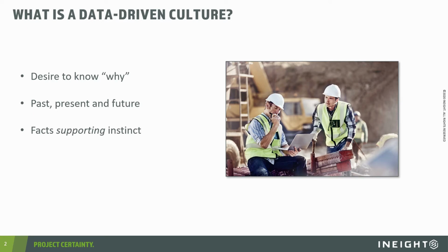If you are looking to achieve a certain productivity factor or accomplish a specific amount of work per day and have never been able to accomplish this in the past, utilizing historical data can help you point to what you could have done differently to meet this goal in the future. In bidding new projects, examining similar past projects can help in accounting for change orders that might arise. Using trend analysis can inform project personnel of where they are projecting to end their month, year, or even project completion. And more complicated predictive algorithms can help project schedulers to create optimal schedules based on past project data.